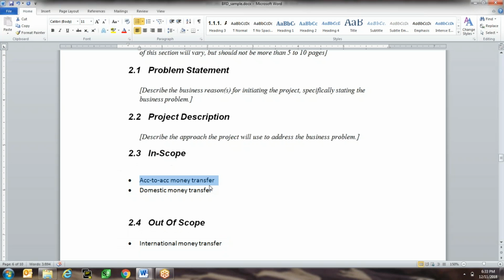You commit to all these functionalities. You write them here. You discuss these functionalities, but you later find out that they are very complex. They are very time consuming. You don't have that time, you, the IT team. So you will not build it. Maybe in future, maybe as a separate project, they'll have to pay extra. Fine. For now, no chance. So clearly draw a line between what is in scope for this project versus what is out of scope for this project.